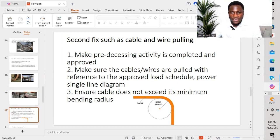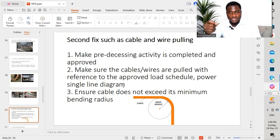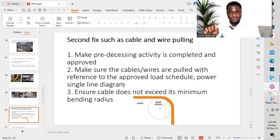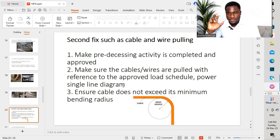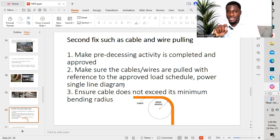Second point: make sure the cables or wires are pulled with reference to the approved load schedule and power single line diagram. Whether you are working as an inspector, as a consultant, or as an electrical engineer on site, you have to make sure that the installation — the cables that are pulled and the wires that have been pulled — confirms as per the load schedule. You highlight all the different areas that have been pulled on the load schedule, confirm the size of the cable, confirm the quality of the cable, and make sure the cable has been approved as well. All materials used in the different activities should have been approved prior to installing on site.